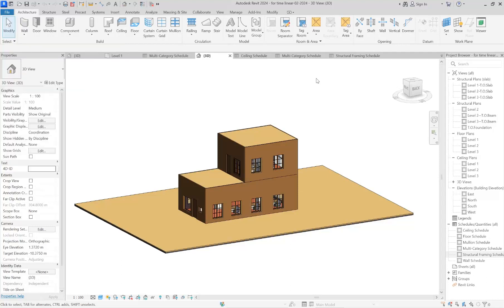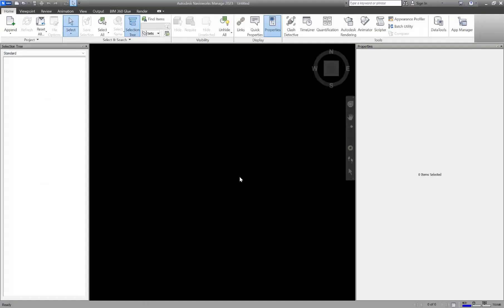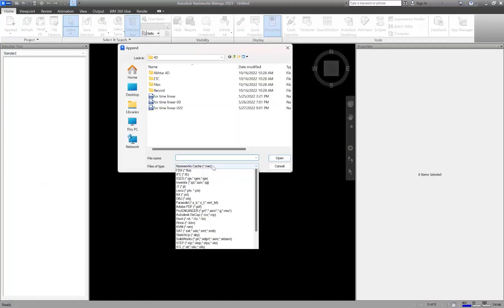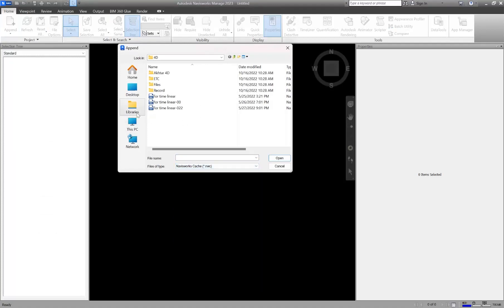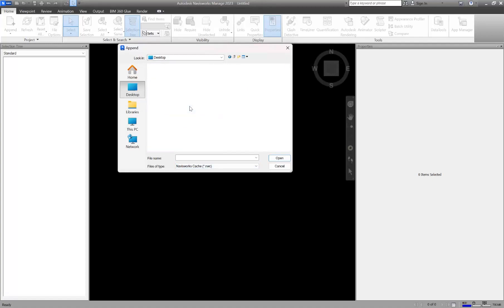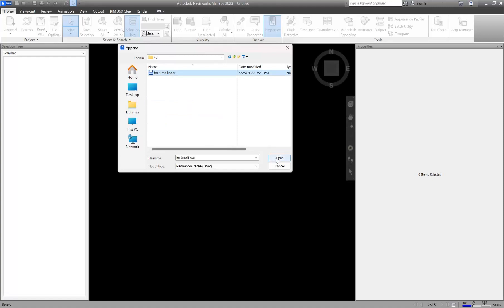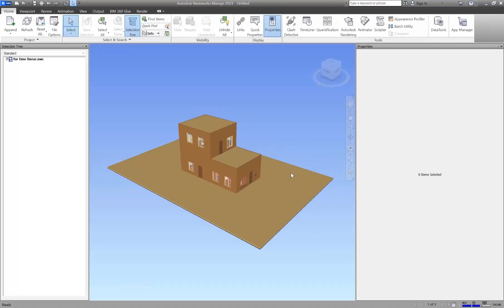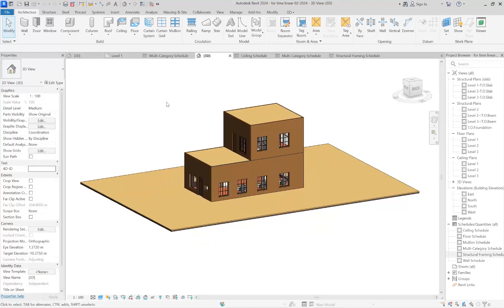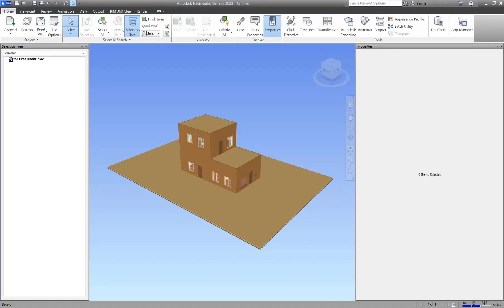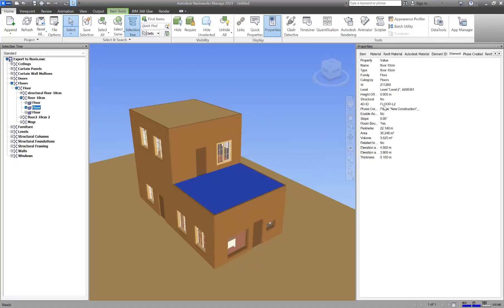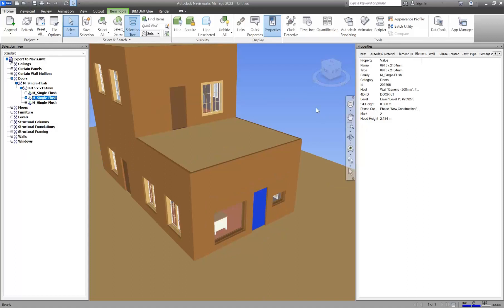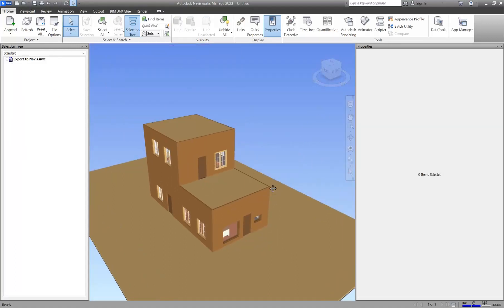In order to transfer this file to Navisworks, you can export it in NWC format or open your Revit file directly in Navisworks. I exported the file in NWC format — let me open it. Once you have your Revit file in Navisworks, you can transfer it directly or via NWC export. As you can see, when I click on an element it shows all the IDs.